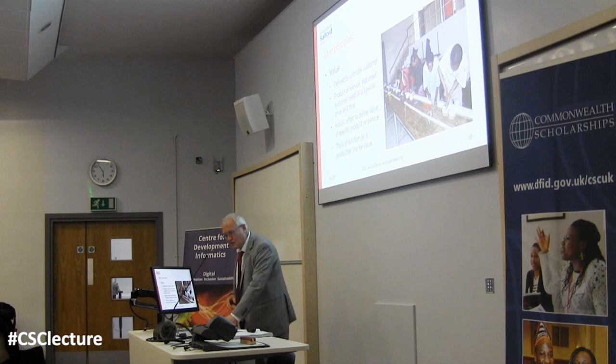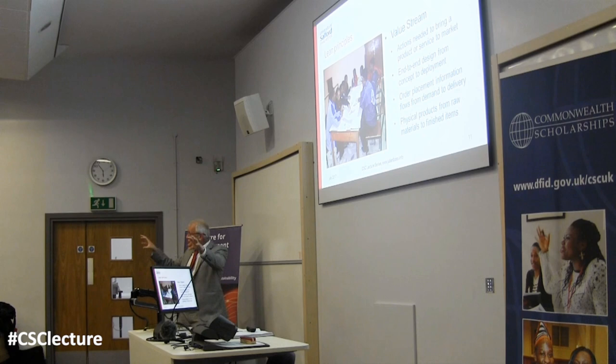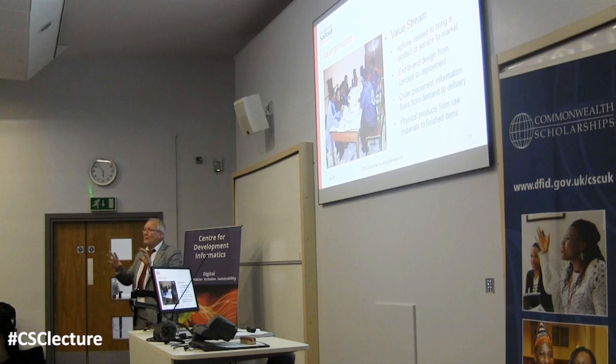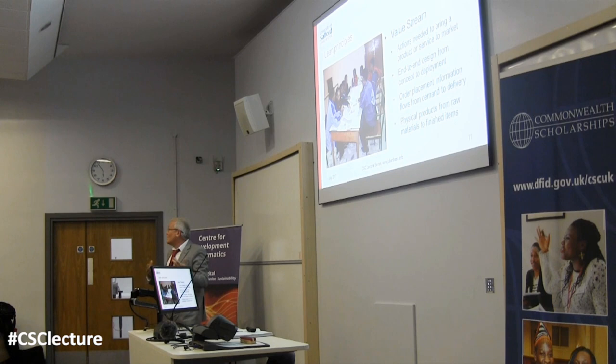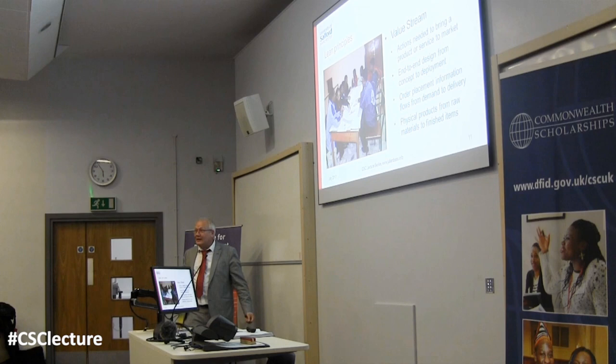And then we think, because I've divided my project into a series of these increments, we can think of a value stream, where each increment is producing some level of value, and I want to look at all of the activities that have gone into that and try to make that as efficient as I possibly can. So I want to look at all the activities that are going on. I want to strip out any activities that are not really bringing much benefit, like writing a 30-page requirements document that nobody ends up using. That's not a very efficient use of resources.